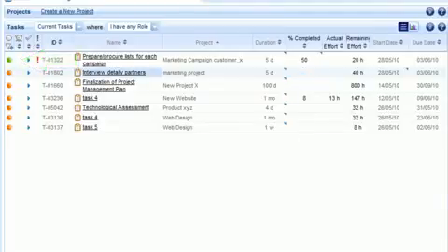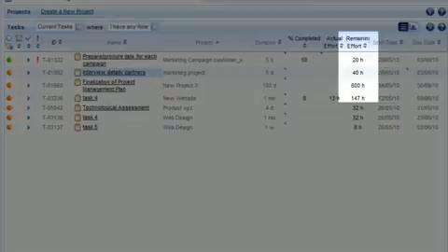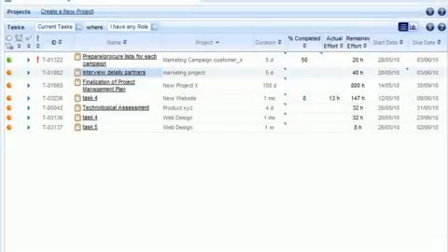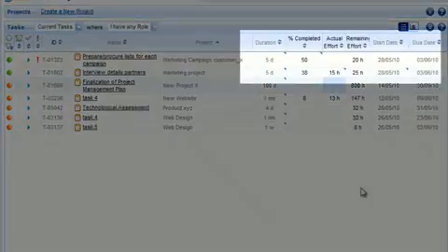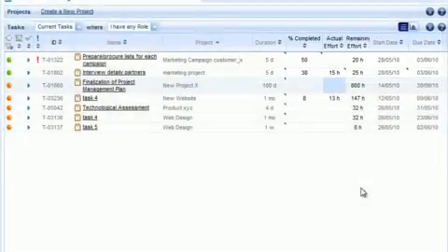On my next task, I'm going to update based on the actual effort I've already put into this task. As you can see, the overall effort that needs to be put in is 40 hours worth of work. Let's assume I've already put in 15 hours worth of work. To update that, I'm just going to double-click under Actual Effort and type in 15H, and then click Enter. See, the system has now updated my percentage complete to 38% and shows my remaining effort at 25 hours.